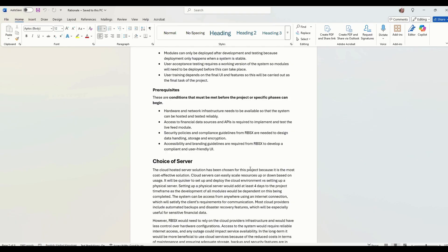Security policies and compliance guidelines from the client, so RBSX. We need those to do the data handling, storage and encryption and then branding guidelines and things like that for the UI.